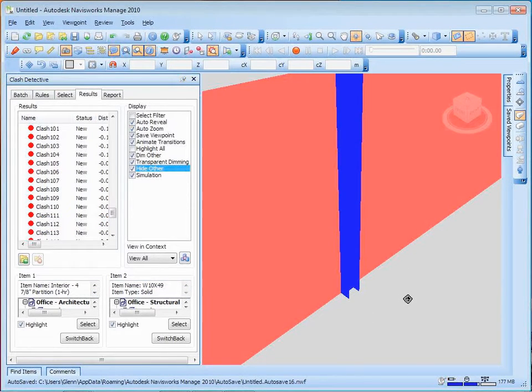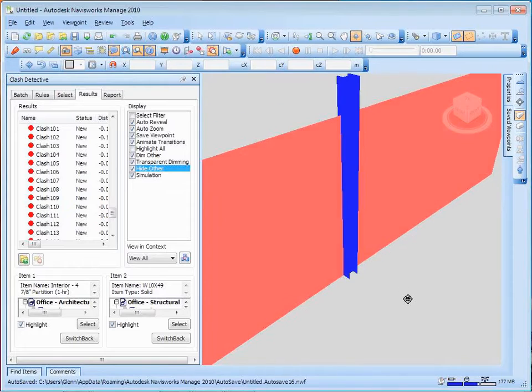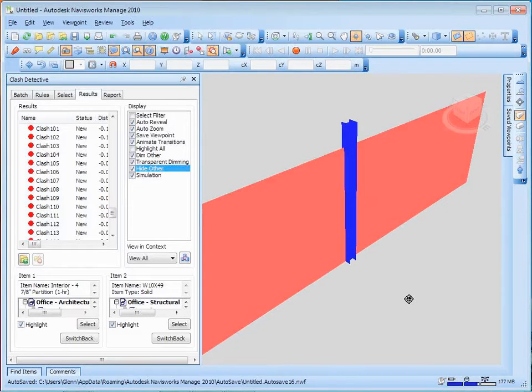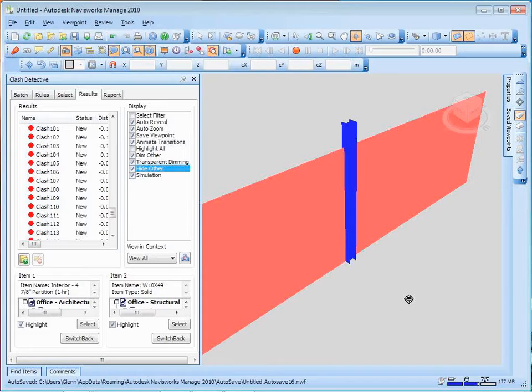And that is an example of, that's what I'd call actually a fair conflict. That actually is something that, in the field, what will tend to happen is we'll build the partition wall right up to the column. We typically wouldn't go through and model it in the level of detail that says every last section needs to be sort of sorted out there.